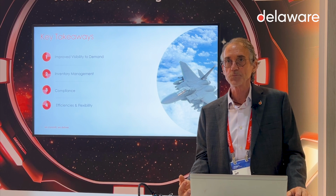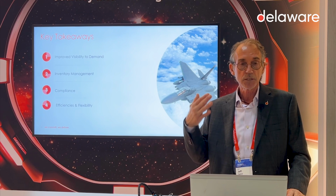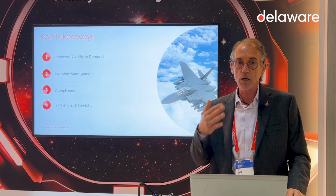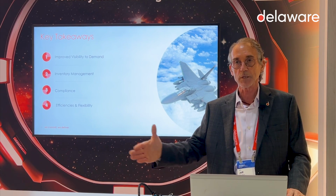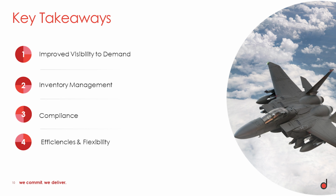So what does it provide you? I've got better visibility to all my demand and all my inventory to satisfy that demand so I can do better planning. I better manage my inventory because I get true economies of scale. I have improved compliance because I'm able to peg my actual costs back to the orders where they're originating from and distribute that cost proportionally when those orders are complete or at periodic points in time to do milestone billing rated reporting for the government. And then finally, I get efficiencies and flexibility that translates into savings in the bottom line.